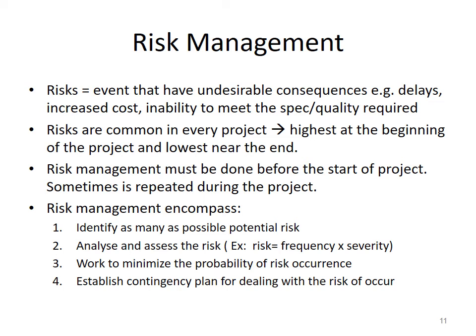Okay, and then we will work to minimize the probability of the risk occurrence. Okay, what are things that we can do to minimize the possibility that risk can occur. And then we also have to establish a contingency plan, okay, to mitigate the risk if the risk occurs.